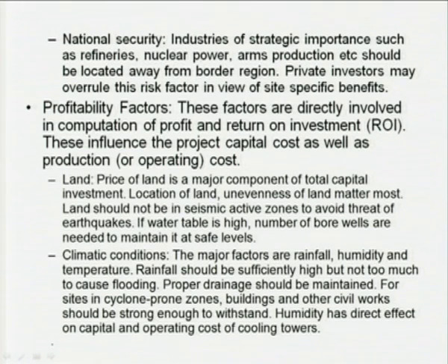Then rainfall will also determine the groundwater. So, if the water supply from the state industrial development corporation is limited, then you have to have your own bore wells, and that will also depend on the rainfall, the availability of groundwater. So, you need to know the rainfall quite precisely. Then again, if the site is in a cyclone prone zone such as the eastern region, then the project owner needs to spend more money on buildings and civil work so as to increase their strength, which will again increase the cost of the project.